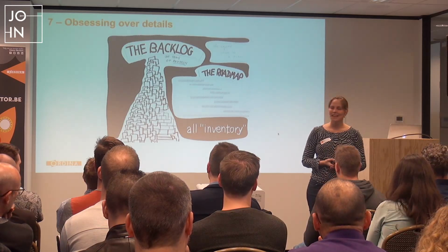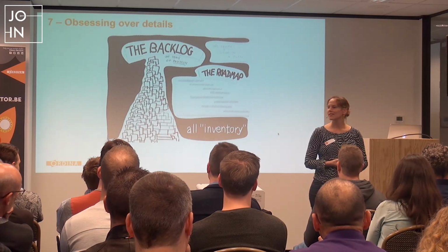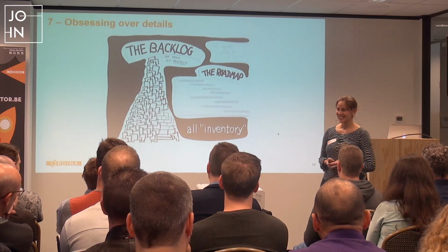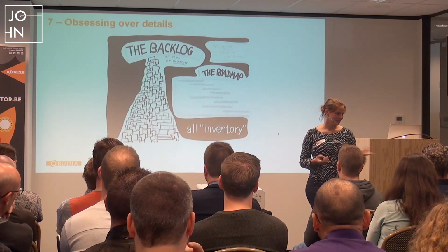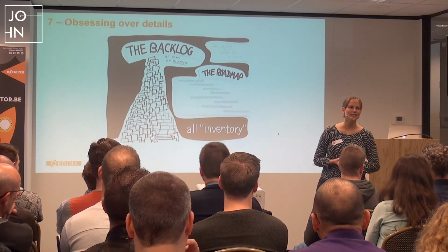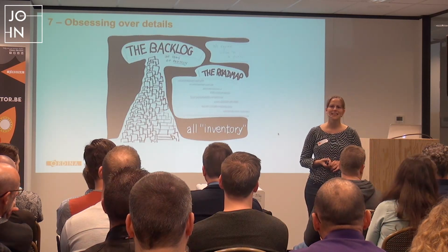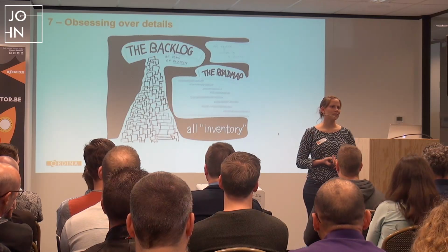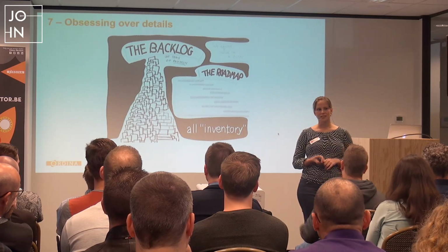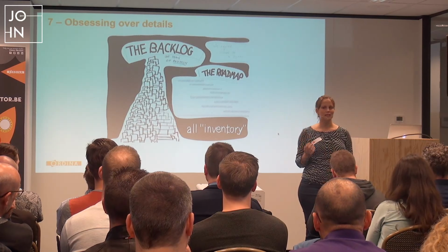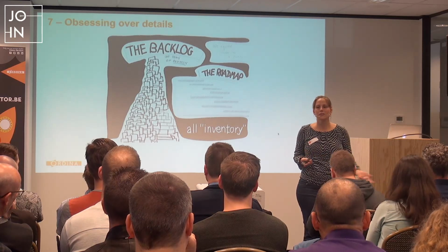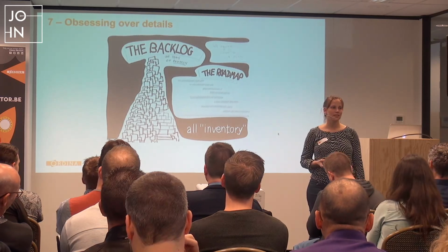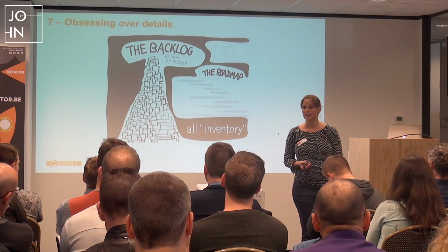Yeah, but having more than 50 backlog items is not worth it. It's waste. It's an inventory from Lean. It's also collecting details in there that were relevant 2 years ago, but until you get to realizing them, they're not relevant anymore. And you stick to that because it's written there, so it must be true, but maybe it's not true anymore. So you fool yourself in not actually chasing after the information that is current, that's accurate.